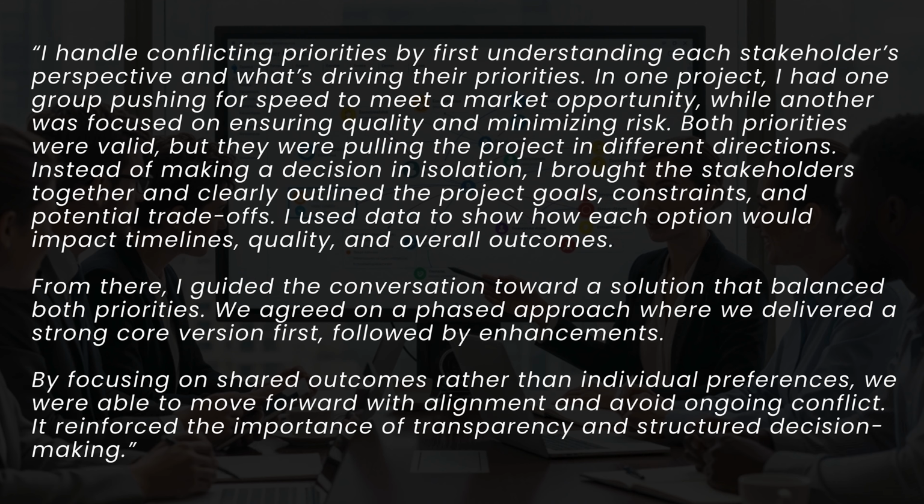Instead of making a decision in isolation, I brought the stakeholders together and clearly outlined the project goals, constraints, and potential trade-offs. I used data to show how each option would impact timelines, quality, and overall outcomes. From there, I guided the conversation toward a solution that balanced both priorities. We agreed on a phased approach where we delivered a strong core version first, followed by enhancements.